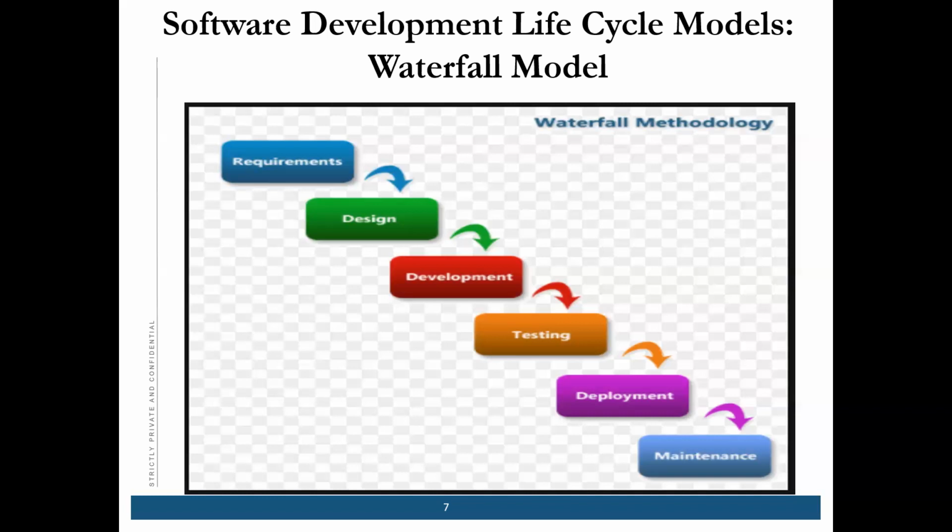So yes, they are using the waterfall model, but only for easy projects, like when you have been developing that project for a long time, and now this is a similar type of project, and you have proper requirements, you have done all the requirement analysis, and there are no additional things you want to add. So they go for the waterfall model because it is cheaper and easy to use.